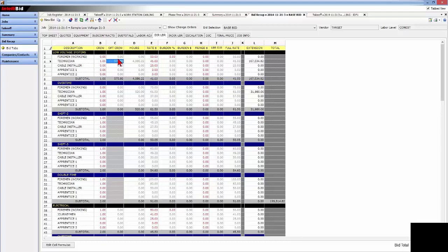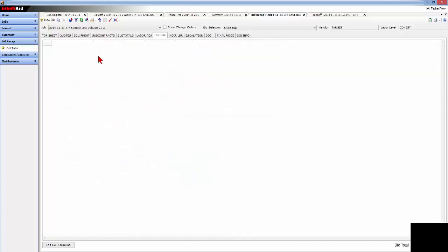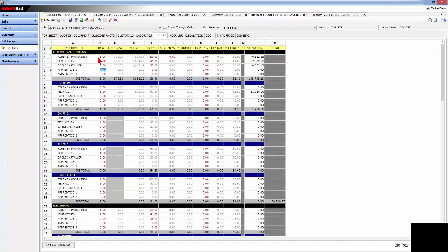Look at the numbers in terms of normal competitiveness or non-competitiveness. That is, if 100% technicians could be allowed for a project without losing the project to your competitor. Maybe you want to blend the crew, so you have $167,000 right now in labor costs, but take the crew and have 5 men as a requirement: 1 foreman, 2 journeymen or technicians, 2 cable installers. It blends those crew mix across the hours, multiplying by these labor rates.